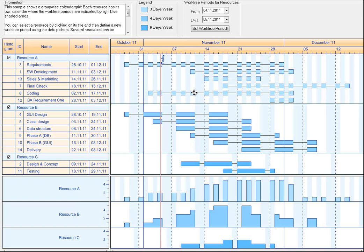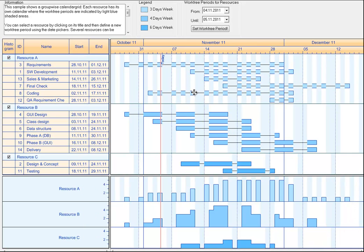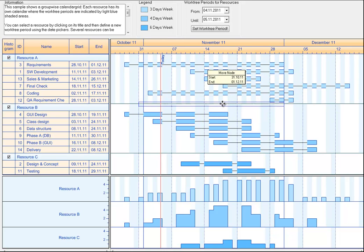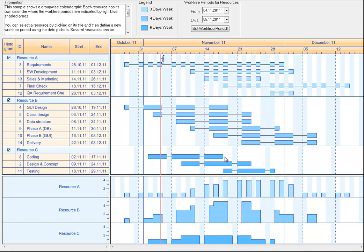This screen shows another Gantt chart feature which is the histogram which gives you additional information about the capacity usage. If you change activities in the upper part of the Gantt chart, the histogram automatically updates and gives you new insights on how these plan changes might affect your capacity situation.